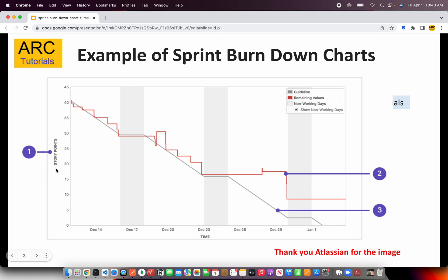On the x-axis you have the story points, and on the other axis you have the days or the dates. Now you see that the line is coming down — it will always come down. It should ideally come down and close all the stories. A red color line going down means a story was closed. So you can see from 40 it closed to 39, from 39 to 38, and then it did not close anything for a period, then a story was closed bringing it down to 35 — so 5 points were closed there.